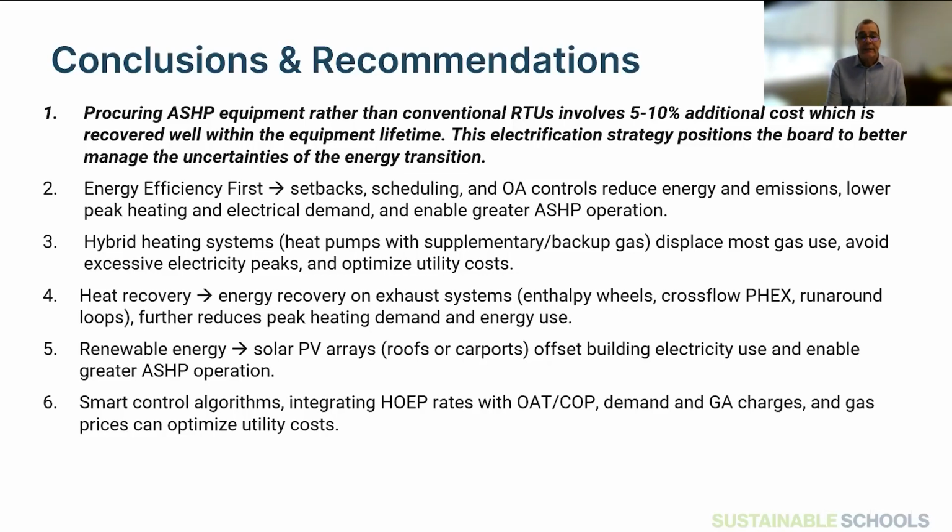Commissioning is critical. I think there's a lot of parts that need to be verified when we are commissioning these hybrid systems. We commission heat, we commission cool, but we haven't in the past been commissioning as to when we're heating with electricity or when we're heating with gas.